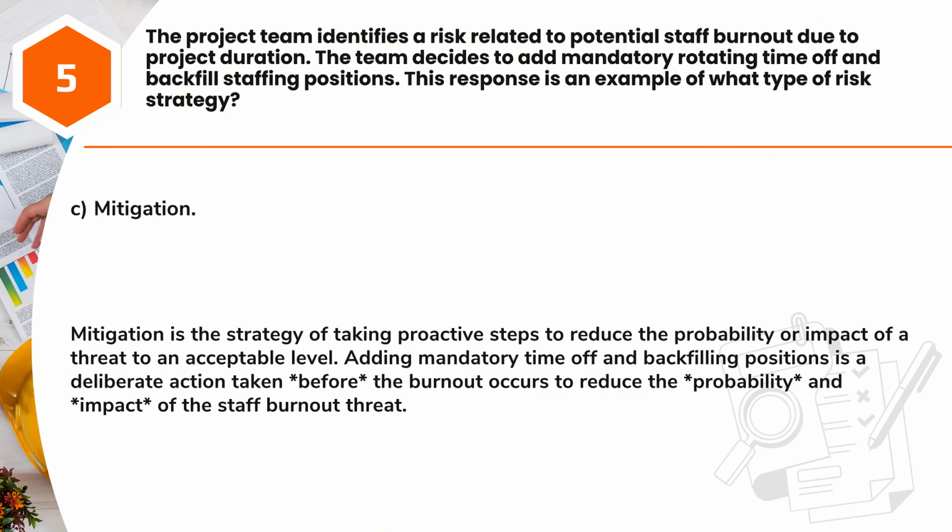Answer C. Mitigation. Mitigation is the strategy of taking proactive steps to reduce the probability or impact of a threat to an acceptable level. Adding mandatory time off and backfilling positions is a deliberate action taken before the burnout occurs to reduce the probability and impact of the staff burnout threat.